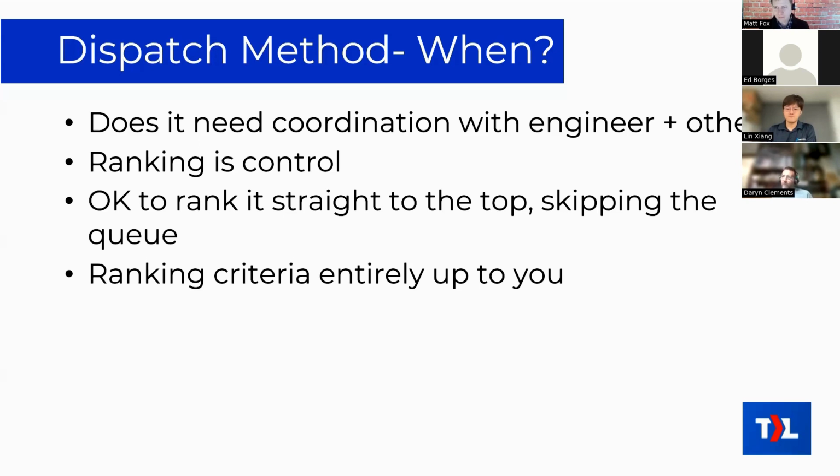So about the ranking, the typical ranking would be emergency tickets when they come in. Those probably actually go to the very top, and then they interrupt somebody. Basically, those are the things where we've got to stop somebody working on whatever they're working on to take that emergency ticket. Big network outage, or major service down, or whatever it could be. Sort of the second priority, urgent but not emergency tickets, those would typically get ranked to the top of the queue.